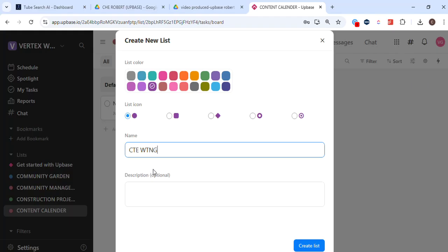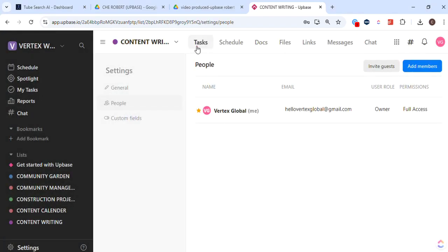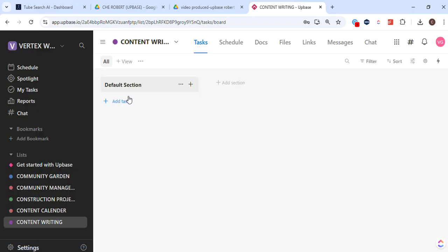Click Add Task, then specify the task details, assign it to a writer, and set a deadline. This helps us because it allows us to break down the project into manageable chunks, making it easier to track progress and meet deadlines. Next up, utilize the Boards feature.